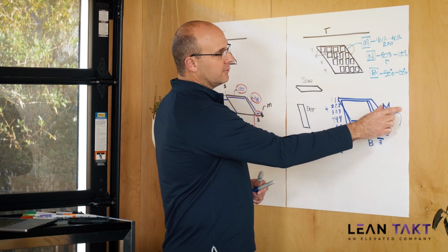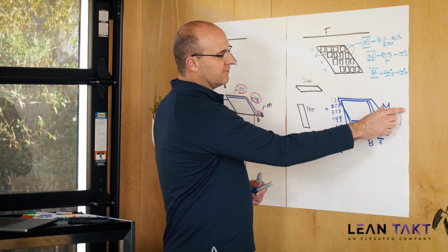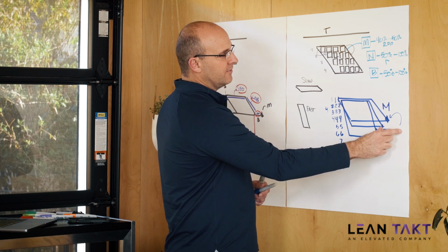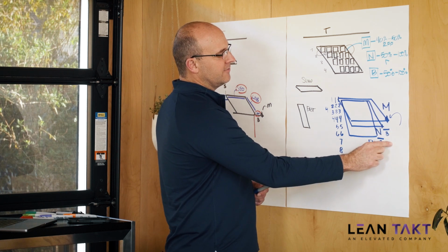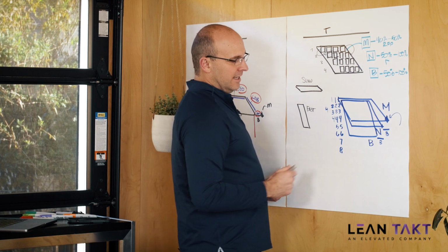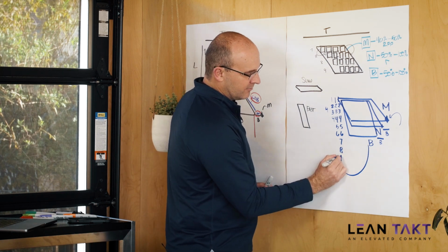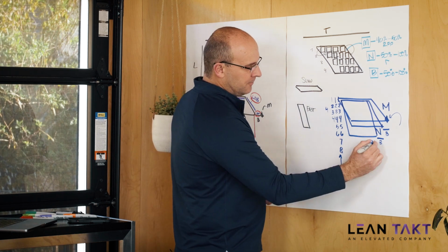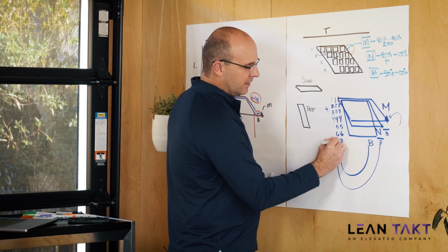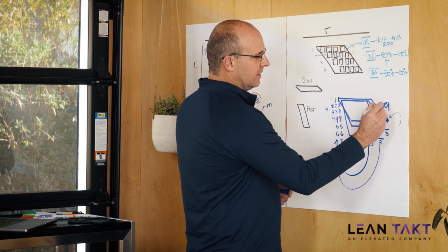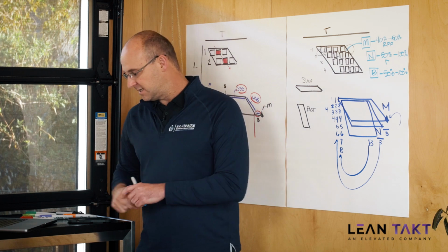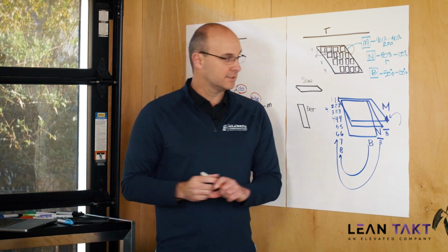This right here, the macro is going to be 40 to 50% realized flow potential. The norm is going to be 50 to 100. The backup will still be 50 to 100. The key is that this backup strategy will have more zones, typically, than your norm. Okay, so what you'll do is you'll say this, and this is key. Actually, I'm going to write this in a different colored marker because I think this is so important.